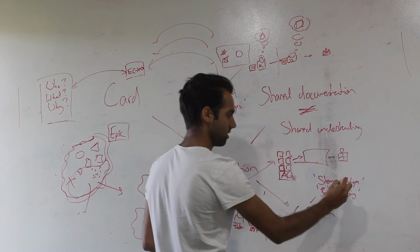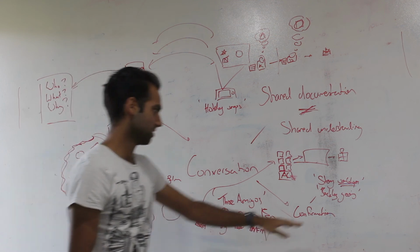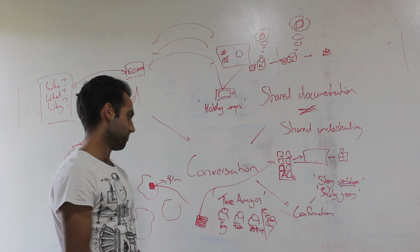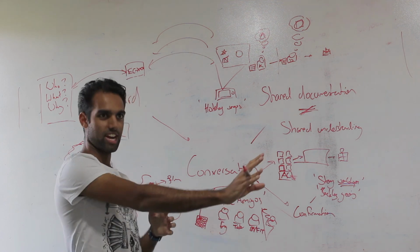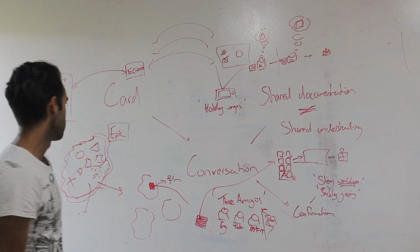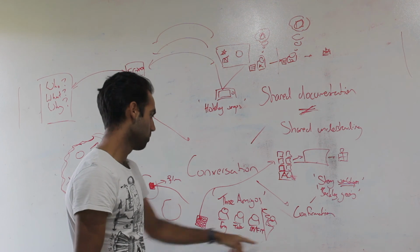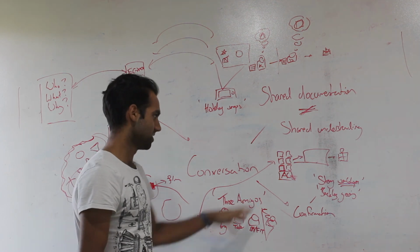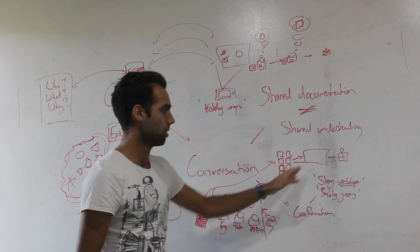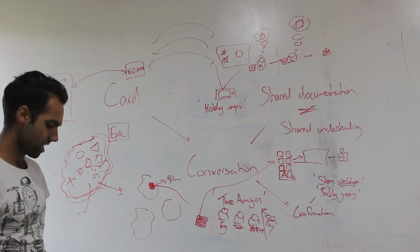I really want to emphasize the workshop thing, because it comes across quite strongly. Sometimes we think of backlog grooming as bringing in a load of stories and then either they're rejected, or, okay, this is how long it's going to take to build. Actually, when Jeff talks about this, he really emphasizes that this is still a workshop, and at this stage we're working together to look at all the edge cases, write the acceptance criteria, and get it into a state where we're going to build it. And that closes the loop really.